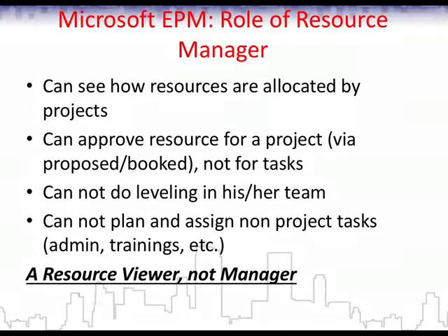A resource manager cannot control how the project manager utilizes his resources, to what tasks his resources are assigned, and what amount of work is assigned. He can only see this with reports, but he cannot participate in this process.